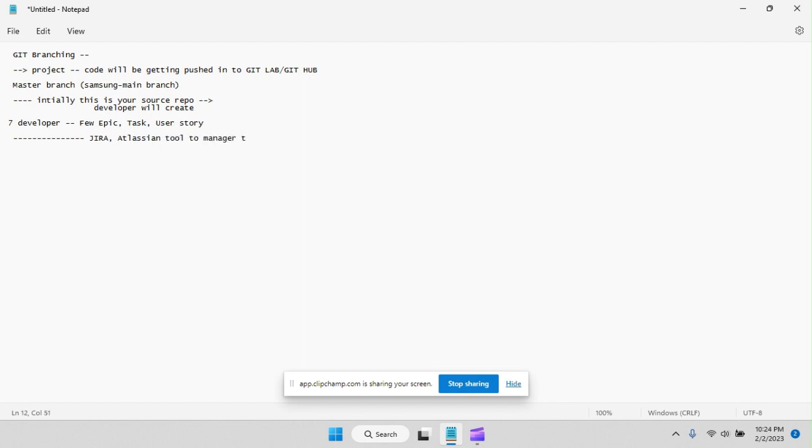to manage the work or tasks. The best tool I would suggest is Jira. It is easy and the most friendly tool, where you can create and manage your sprint board and prioritize your work. You have the complexity of a ticket, whether it is highest, high, medium or low. You can add labels, log the effort you have spent, and attach test case execution over there. You can create subtasks, and you can link a ticket to a different ticket and add a dependency.